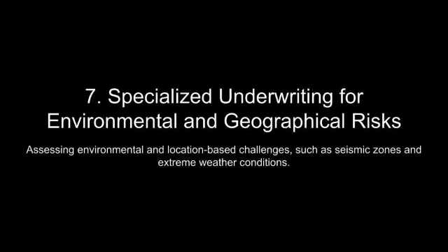For instance, if a subcontractor files both a lien and a bond claim, the surety may be forced to litigate the priority of these claims, particularly in states like Florida, where lien waivers and bond rights are intricately linked. Effective underwriting policies should explicitly address these scenarios, incorporating provisions that require claimants to elect between lien rights and bond claims to limit duplicative liabilities.